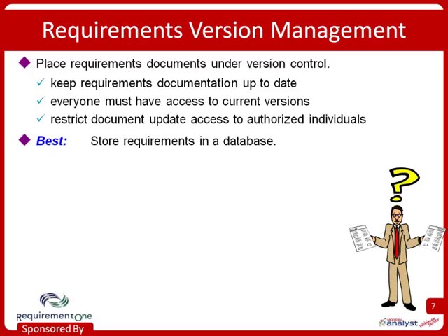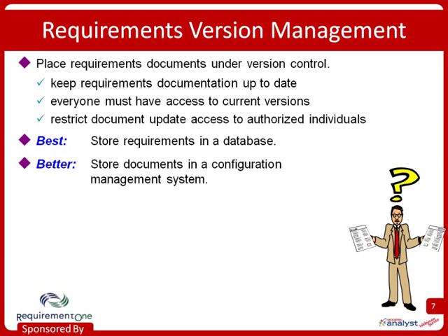You know, a lot of these tools will retain a complete history of every change that's been made in a particular requirement. So that's very convenient. And if you're not ready to do that yet, then a better approach, not the best, but better than nothing, is to store your documents in a configuration management system and use check-in and check-out discipline so that people are, you know, at least doing change in a controlled way and in a recorded way.